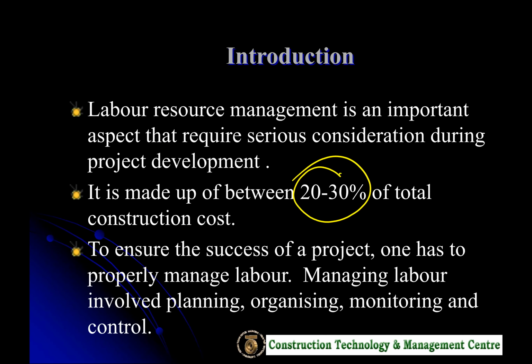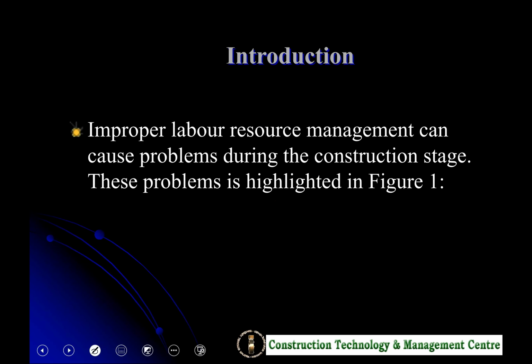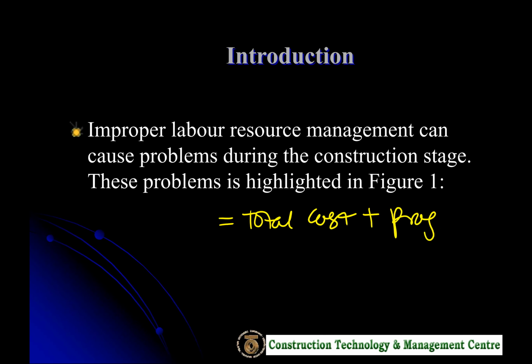But anyway, being 10%, 20%, or even 25% is a very big amount that we need to manage. Remember, in construction, very simple formula: total cost plus profit equal to value, what we call contract value.